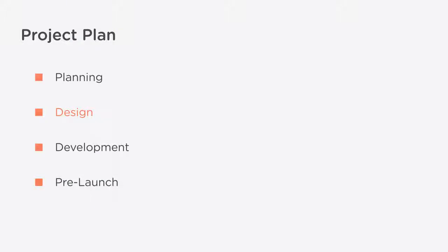The client won't agree with you on everything, of course, but the point is to come to a solution that benefits both parties. Once you have the wireframes and mockup set, you can move on to coding it up, unless you did your initial mock straight in CSS, of course. Regardless of how you set up your stages, make sure each stage has deliverables. So after a certain period of time, you send the client your wireframes and mockups, give them plenty of time for review, and then spend the remaining allotted time during the design stage coding up the visual elements.